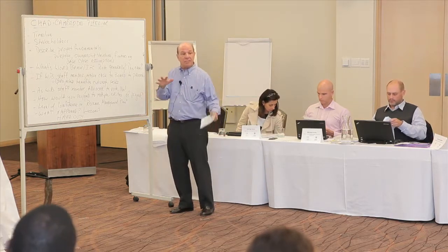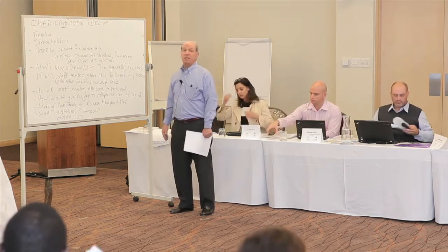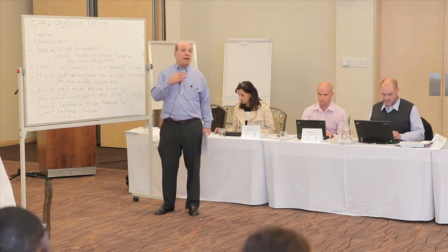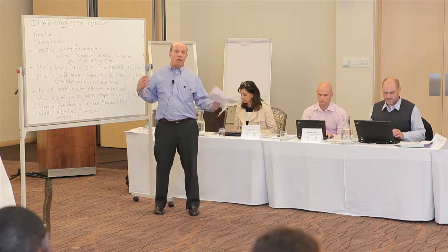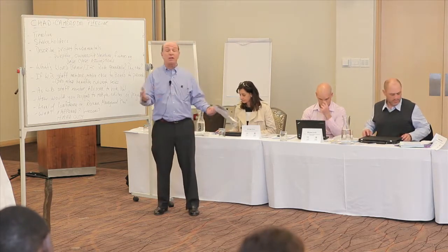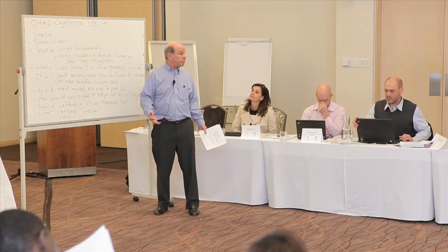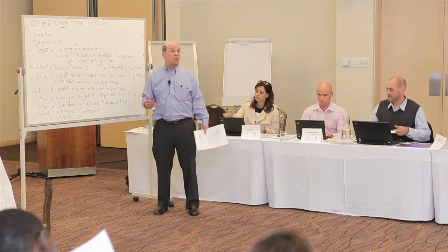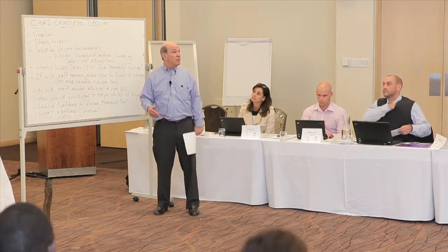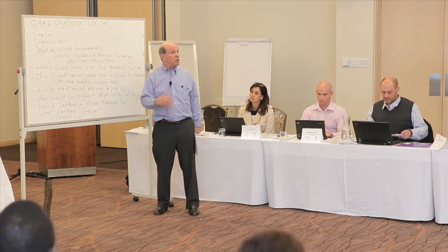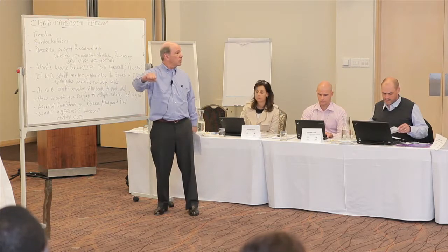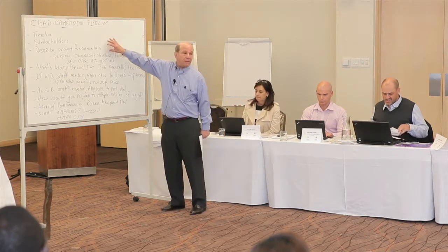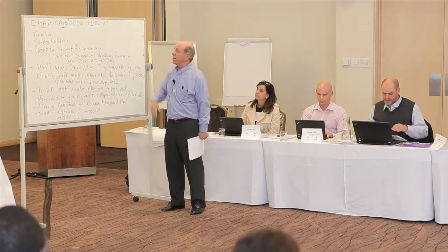You don't have to have the numbers, but you have to have a general overview of how you finance a project like this. And to do that, you may not have paid attention to this, but it's relevant. As I told you this morning, I used to work in the IFC, so I worked on a lot of projects like this, not necessarily like this, but projects. You develop a base case of what you expect is going to happen over a period of years. And that base case, of course, is based on a set of assumptions, based on the industry, the owners, and everything you happen to know. But everything is driven by that base case, whether the project is going to make it. So I just want you to be aware of that. We won't talk about it very much, but I do think we have to be able to describe what this is about, and who the potential beneficiaries are.